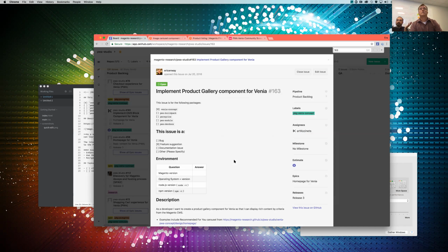Again, we're just deciding: less than a day is 1, a day is 2, less than half a sprint is 3, half a sprint is 5, more than half a sprint is 8. Yep. All right. And maybe to build, I think there's the estimate piece, and also is this the right level of detail too? I know we've got a different format, a little bit more specificity. Do we want to add anything more to this based on what we just talked about?